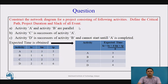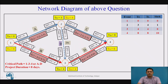In today's question, we construct the PERT network diagram for a particular problem. The three time estimates are provided for each activity, along with a description defining the interdependency between activities. The expected time is calculated using the formula seen earlier. With this data, the network diagram is constructed, defining each activity's duration and event slacks. The critical path is through events 1, 3, and 4, and the project duration is 8 days.